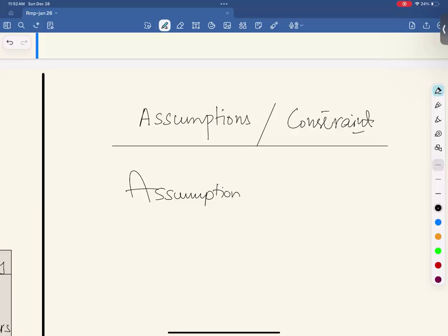So you develop an assumption log. It's a separate document where you document all of your assumptions and you review them throughout the life of your project. Right? So assumption analysis helps you generate project documents in standard form, interpret the data easily, and review the data to test the functionality.